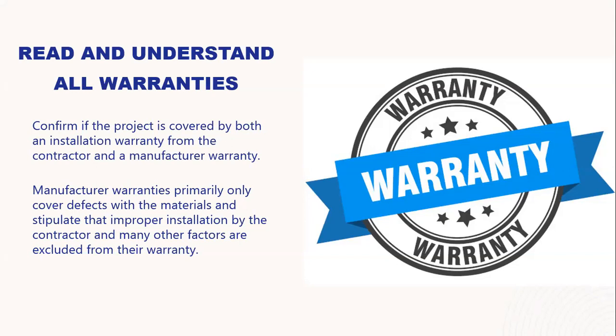Something to keep in mind if it is a major replacement, if it is coming with a manufacturer warranty, most of the time, the manufacturer warranties are quite limited and are subject to deficiencies with the actual membrane or the product itself. It does have a long list of stipulations on exclusions, and a big part of that is if it is not installed properly and not installed to their guidelines, their warranty does not cover any deficiencies with the membrane.